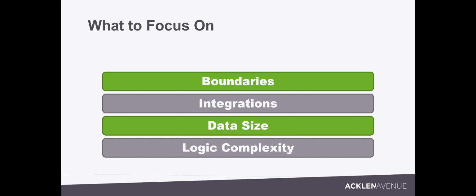First name, that's a first name field, usually you cannot put more than X number of characters in it. We have this kind of check, and that's a basic validation. So I might say there's 20 fields. 10 of them are just simple data entry with basic validations. 5 of them are integrations into an outside source to get this data. And 5 of them have this level of complexity of logic behind them.